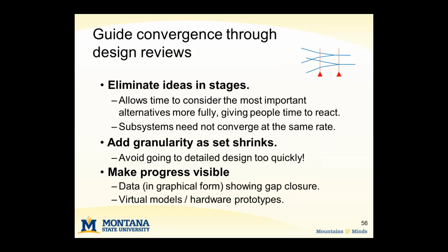And only add granularity as it makes sense. Try to avoid going to detailed design too quickly, because if you end up going to detailed design, detailed analysis too early and redoing it, then again, you've caught yourself in a loop back. If you can make your progress visible, that's really, really helpful.